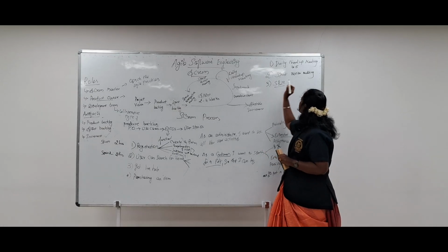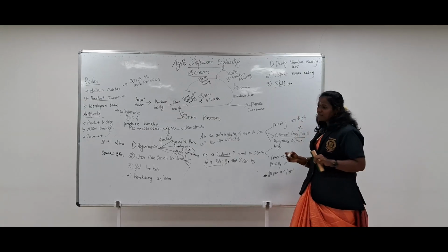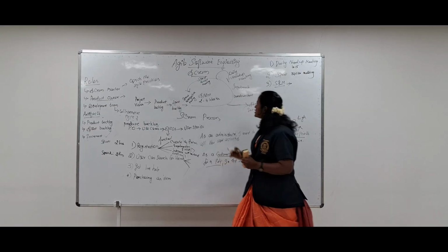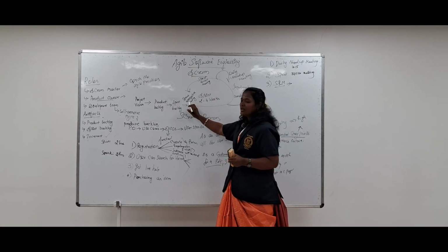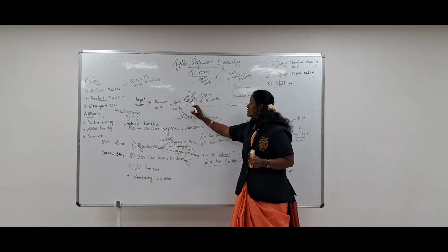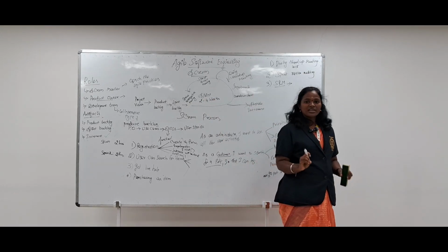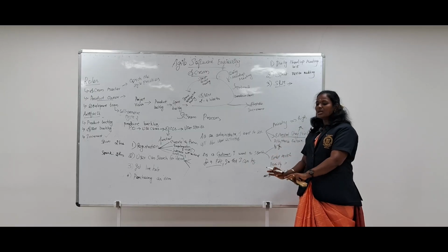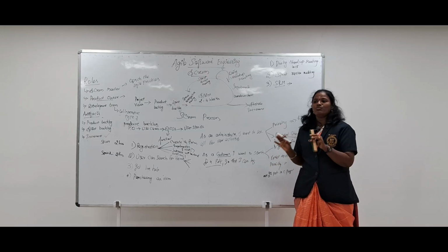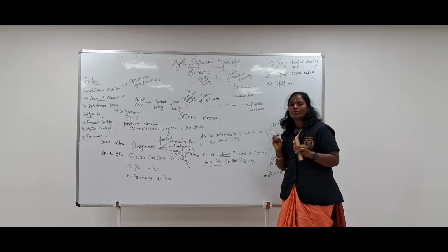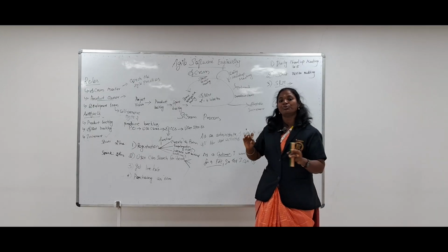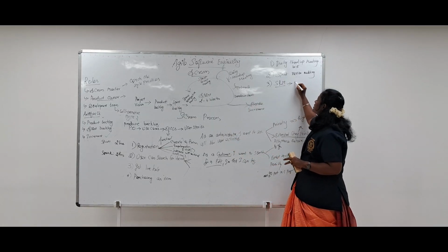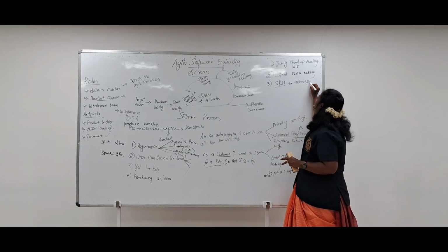And the next one is the sprint retrospective meeting. At the end of the sprint, we have to conduct the sprint retrospective meeting. In the previous sprint, what went well and what did not go well, what the drawbacks were, and how this can be improved in the next sprint. That will be analyzed in the sprint retrospective meeting.